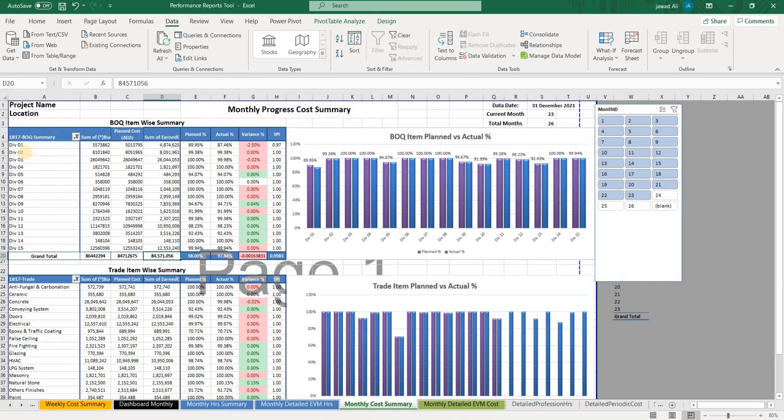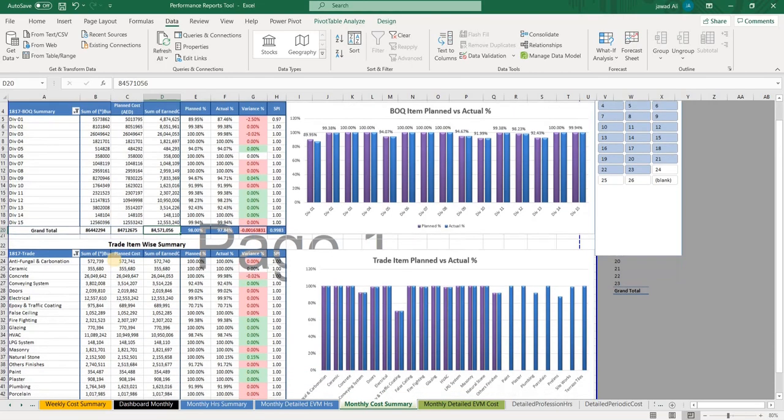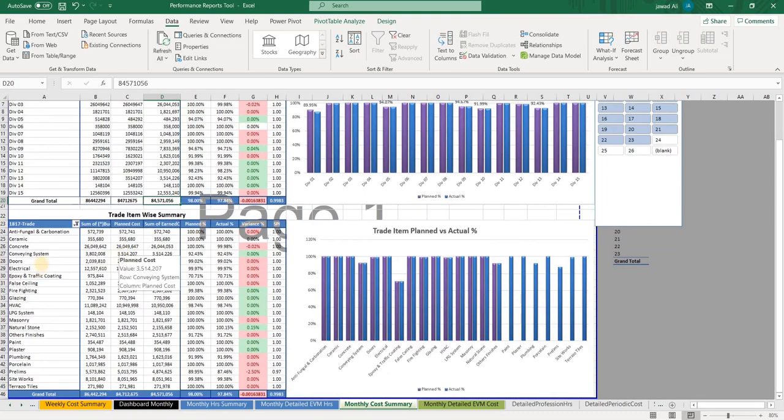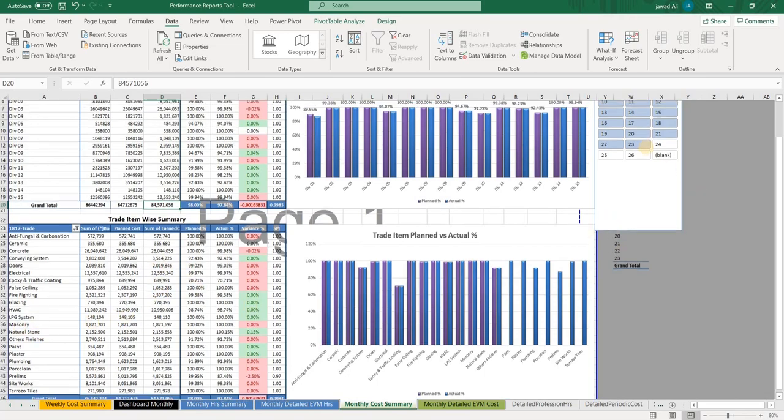As you see, where it is coming from, it is coming from the division wise. Now we have the breakup in terms of divisions, and these divisions are mostly made standard wise. Division 3 is your concrete, division 4 is your masonry, then metal, joinery systems, and division 9 like finishes, all these things. We also have some key items breakup like carbonation paint, ceramic, concrete, and it is giving me the values based on this breakup.